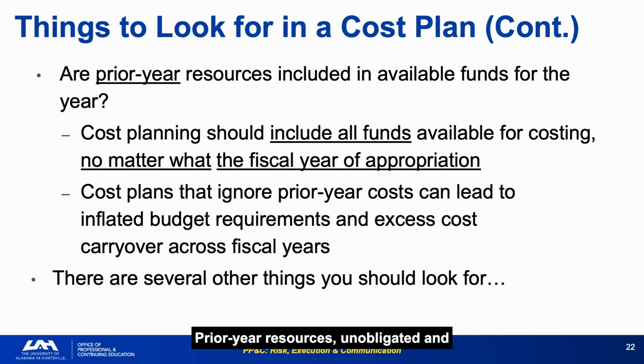Prior year resources, unobligated and uncosted balances from previous fiscal years, must be included in the available funds calculation before developing new requirements, or the result will be inflated requests and excess carryover. This is the mistake that creates the large, unobligated balance problems described earlier in the module. Analysts who plan each year in isolation, without accounting for carry-forward funds, repeat the error in every cycle.